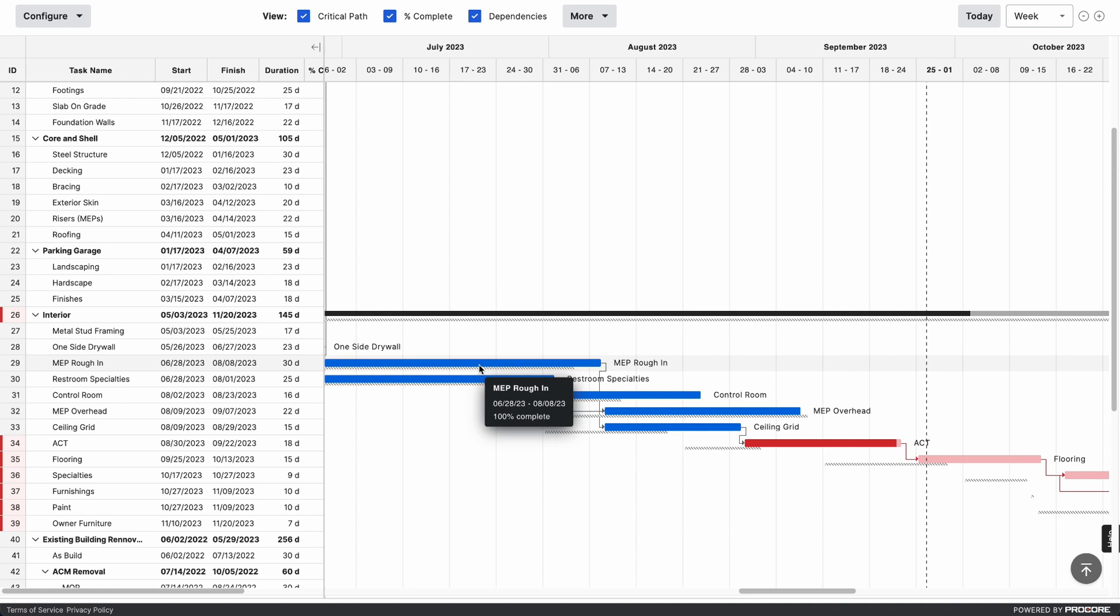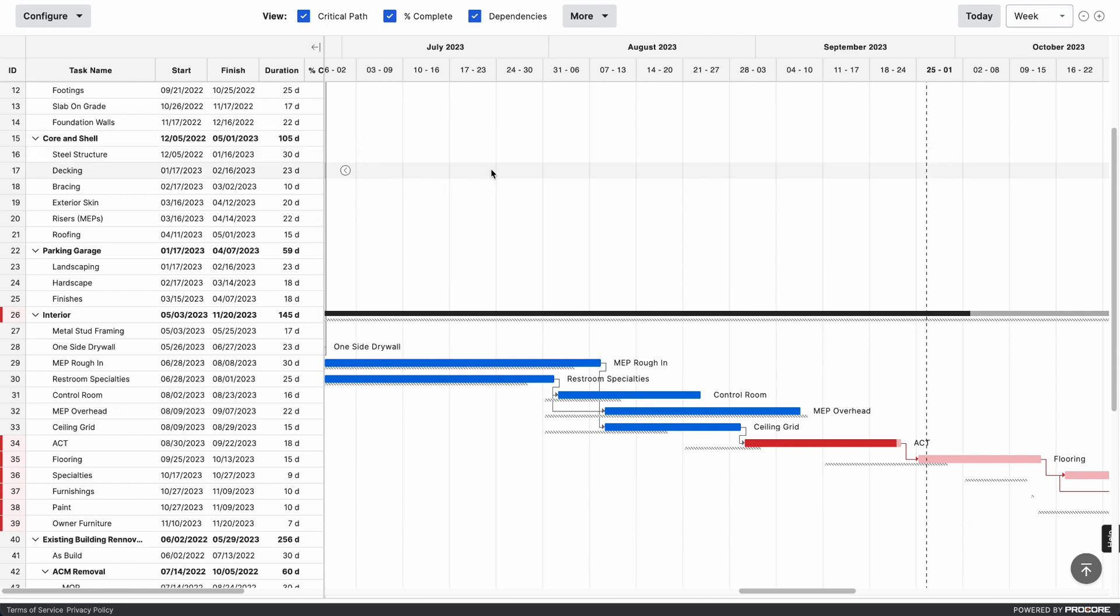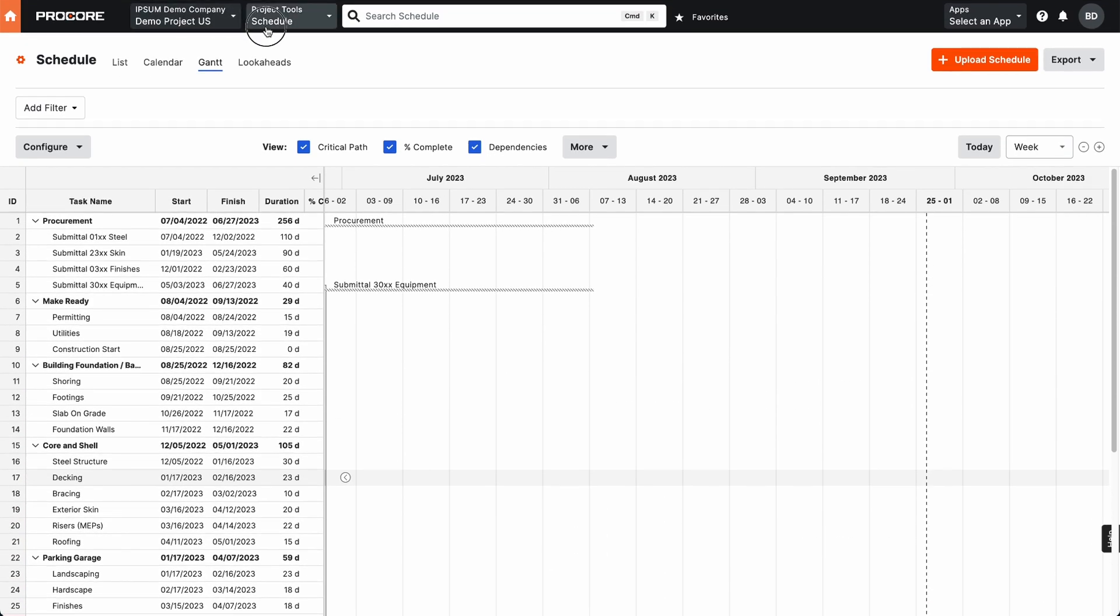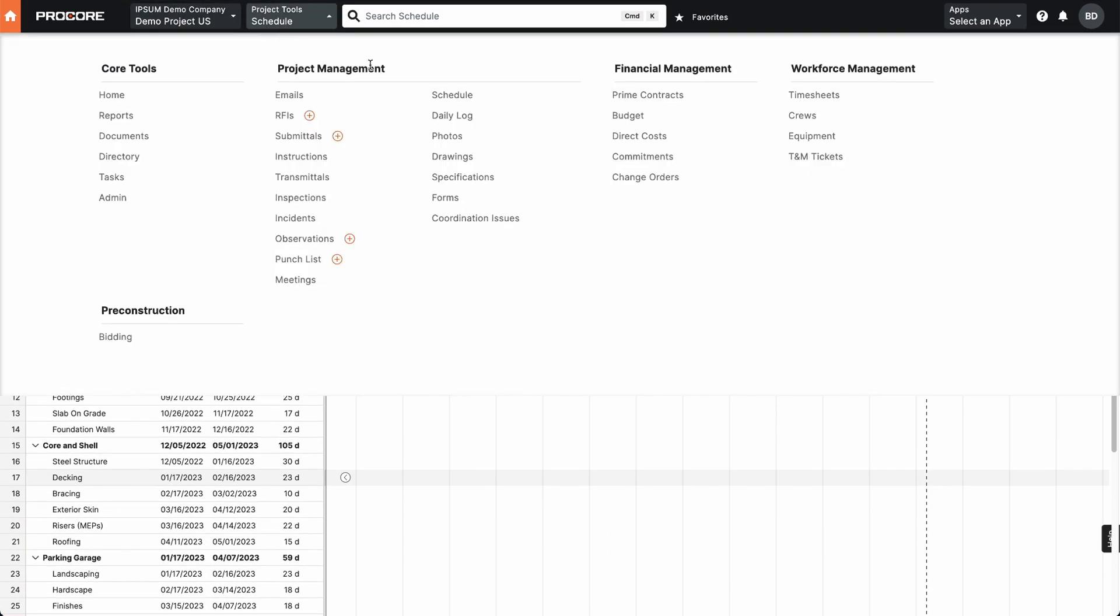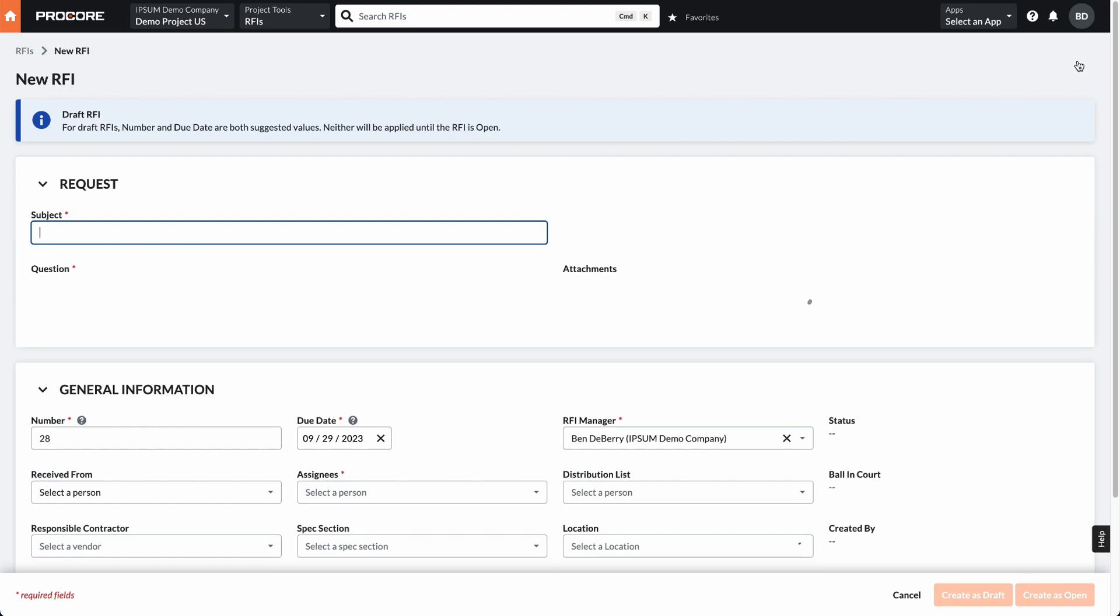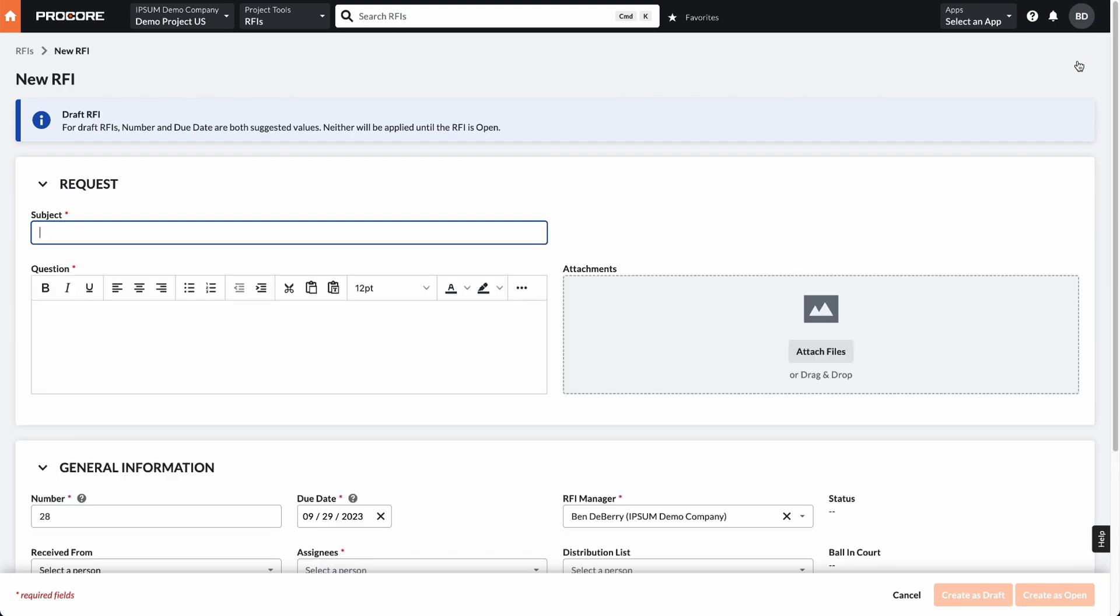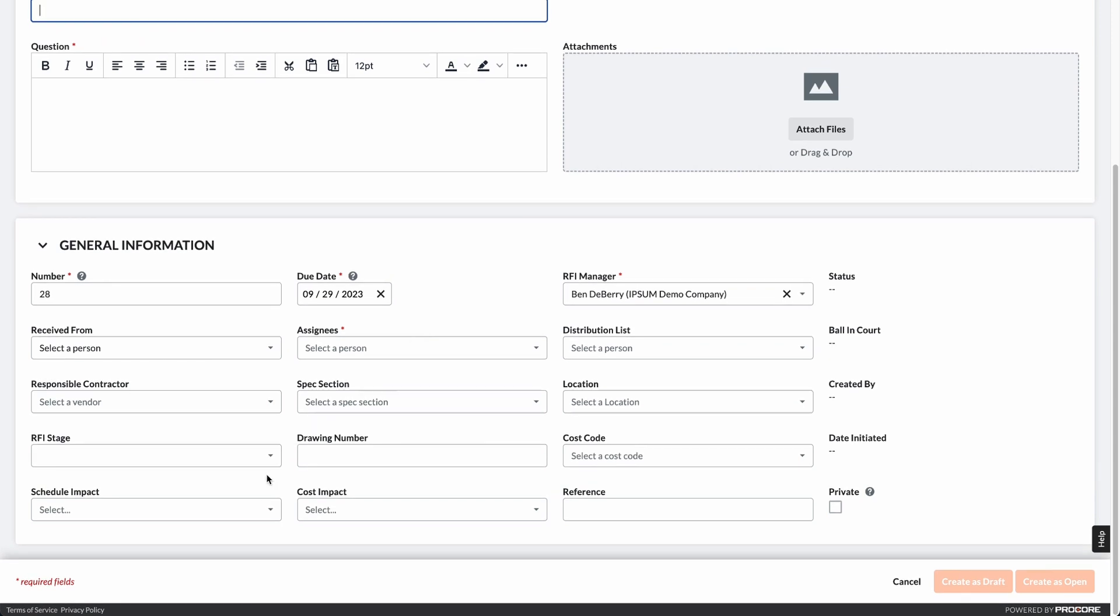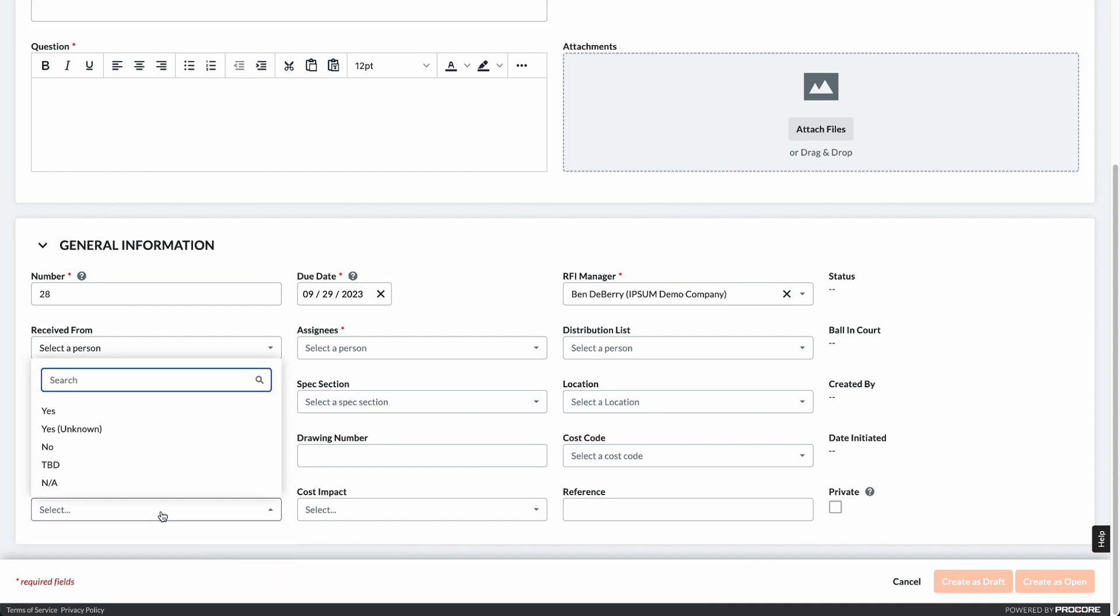Now what's very nice is once I have this schedule connected, now I have more tools available for me. I can come into Procore. I can go to my RFI tool. I can create a new RFI. I fill in the normal subject matter that I would. And then when I get towards the bottom of my screen and your Procore view may look a little bit different, you should have the option for a schedule impact.